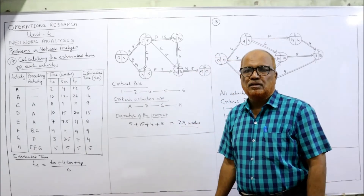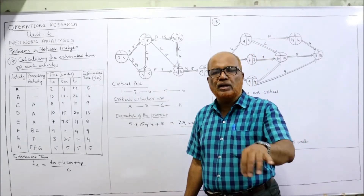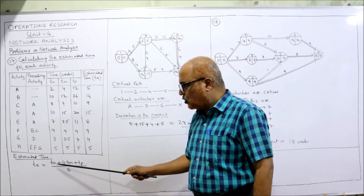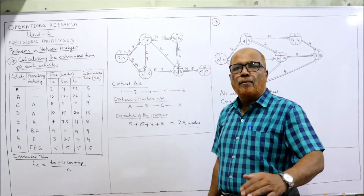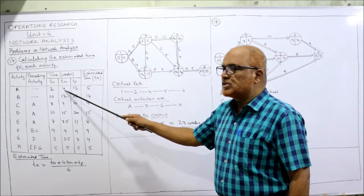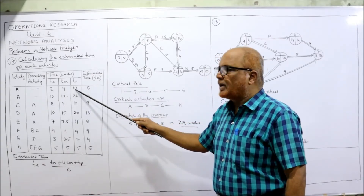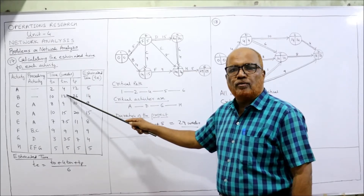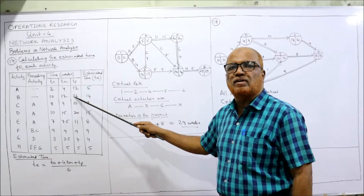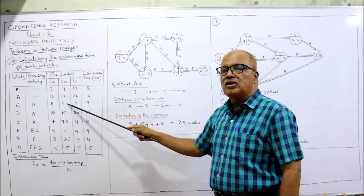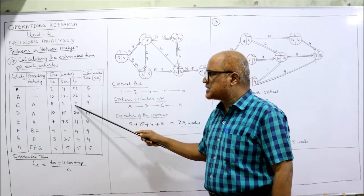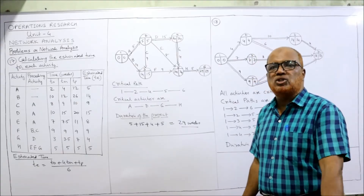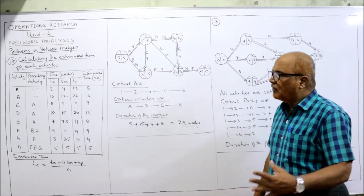We don't require variance since no probability is asked. The formula for estimated time is te = (to + 4tm + tp) / 6. Multiplying tm by 4: for example, 16 + 2 + 12 divided by 6 gives 5; 48 + 10 + 26 divided by 6 gives 14; 36 + 8 + 10 divided by 6 gives 9. Calculate all estimated times for each activity this way.